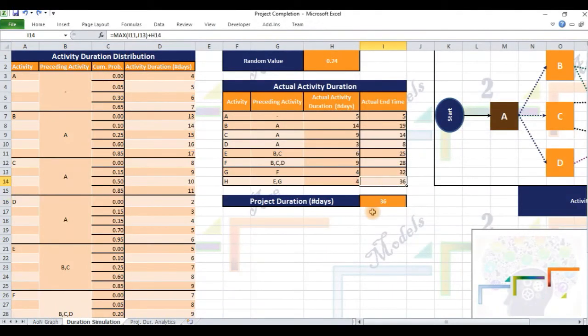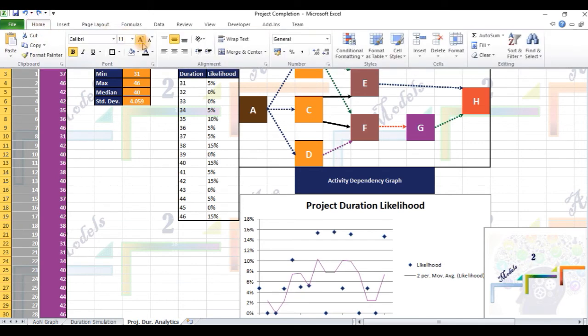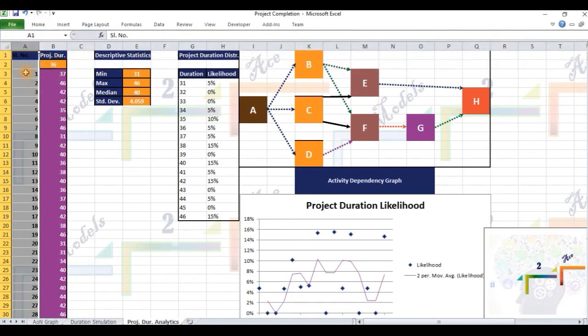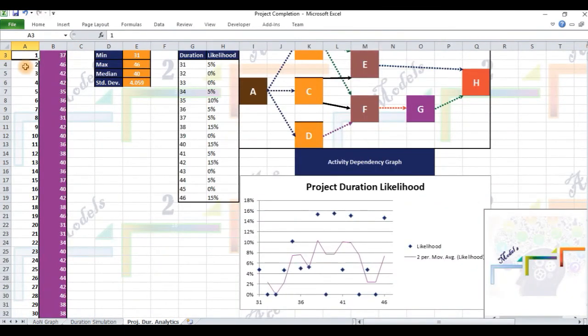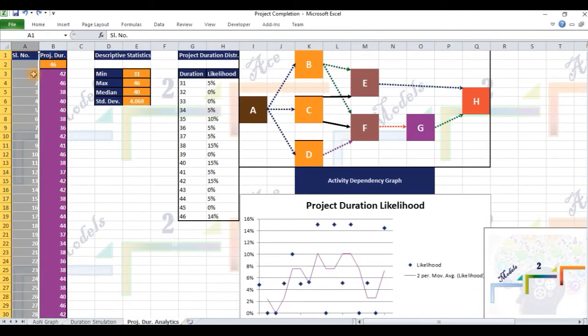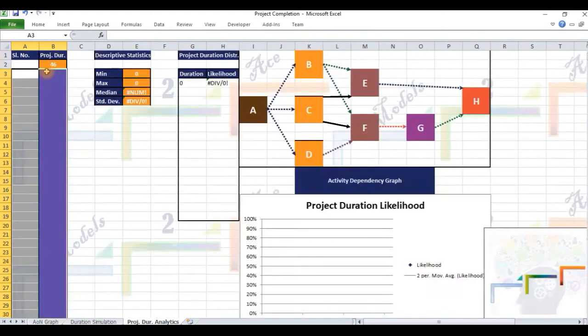Suppose we want to generate 1000 possible project duration values in cell I16 using this model and create a table of these values. We automate this model invocation and recording the output value using Excel's data table function. The possible values are recorded in column B as highlighted. To do this, we use a sequence of 1000 numbers obscured in column A by using the same font color as the cell background. Let us see how this table can be constructed afresh.